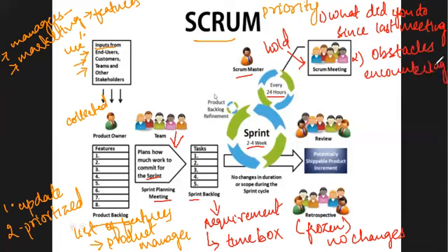Now in here, if the first question is, what did you do since the last meeting, and the answer is that you have not done anything, then why have you not done anything? It can be due to some specific risk or some specific obstacles. So these obstacles are going to be identified within the Scrum meeting. When you identify the obstacle, you're going to identify what is your plan by the next meeting. As you identify the different obstacles, how you're going to eliminate those obstacles, what are you going to do within the next meeting?